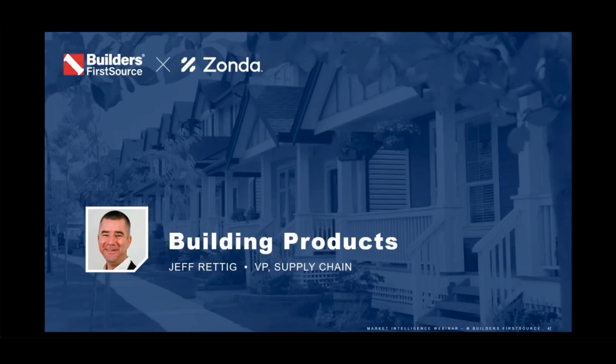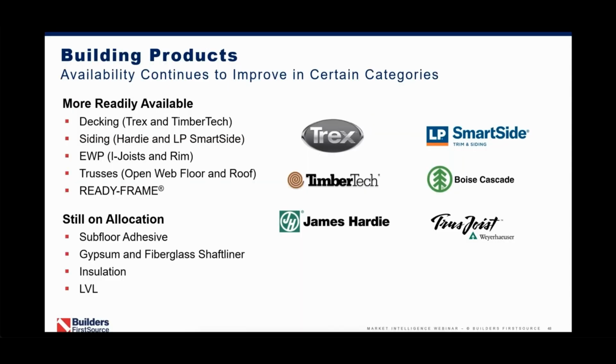Everyone, I'll cover some of our building products real quick. Availability on next slide, Jack. Availability is steadily improving in some of the building products. Both James Hardie and LP SmartSide have additional production coming online, and availability will continue to improve over the next 2 quarters. As Ali referenced, with the slower housing starts back to 2019 levels, we are seeing the availability of I-joists already come back in line with traditional lead times, and we expect to see LVL lead times come back in line with historical expectations over the next few quarters.